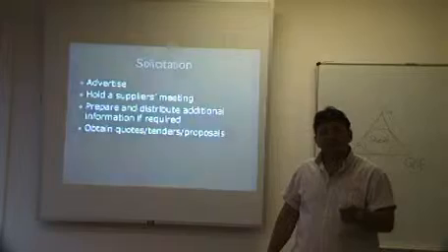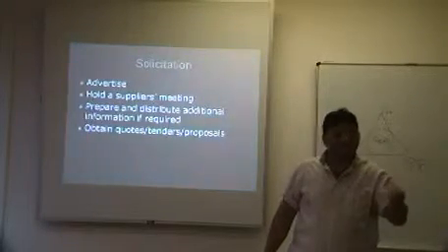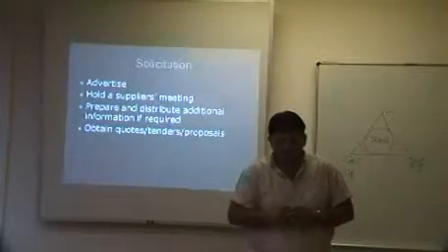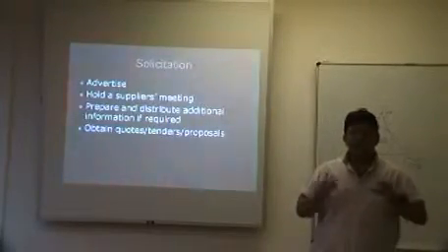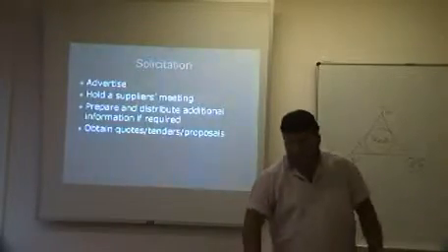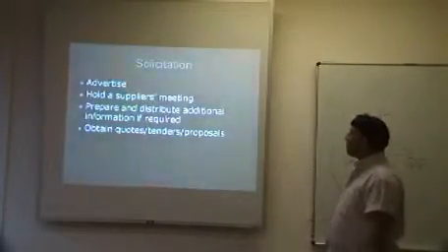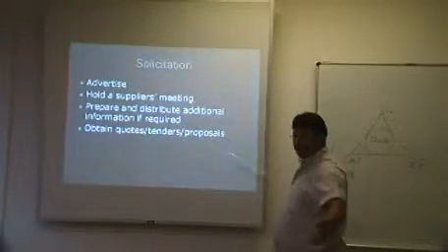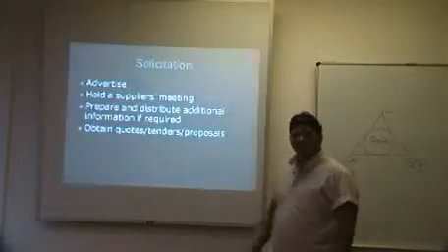And if one piece of information is given to one vendor, that same piece of information is given to all the other suppliers as well, just to bring fairness into the process. Then, after that, the supplier will submit their tender or their proposal or their quotes.